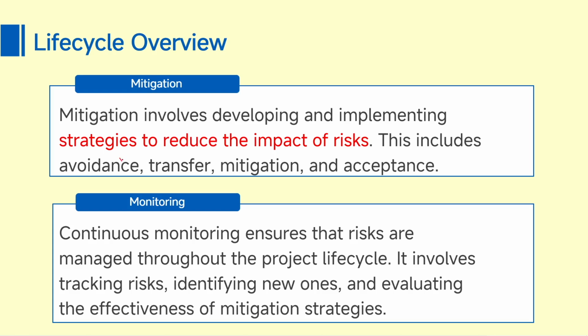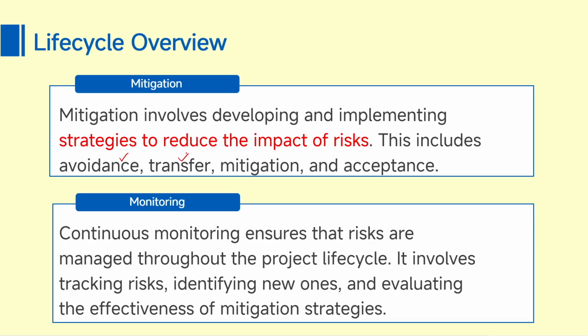So avoidance is going to be the process if you are trying to mitigate prior to the occurrence of the risk. So you are trying to avoid that risk by taking a particular set of steps. Transfer is you are going to change this risk to another risk, which is manageable probably, and mitigation is you have taken that risk and you have actually gone through a certain set of procedures in order to overcome that risk. Fourth stage is acceptance. There is no other way, we have to live with that corresponding risk and you have to go forward.